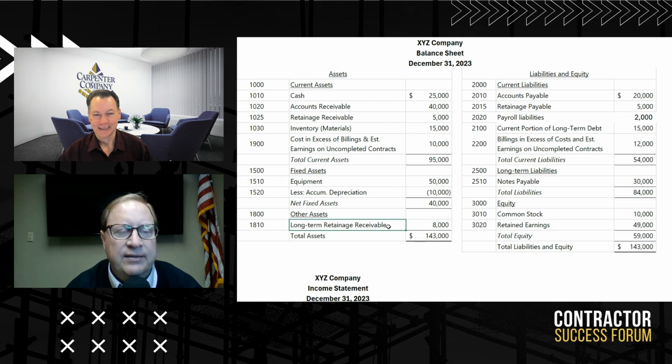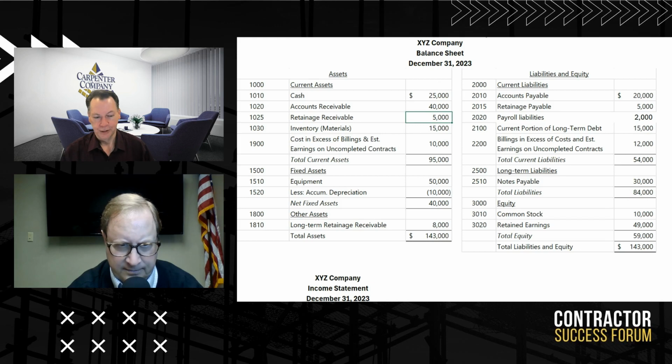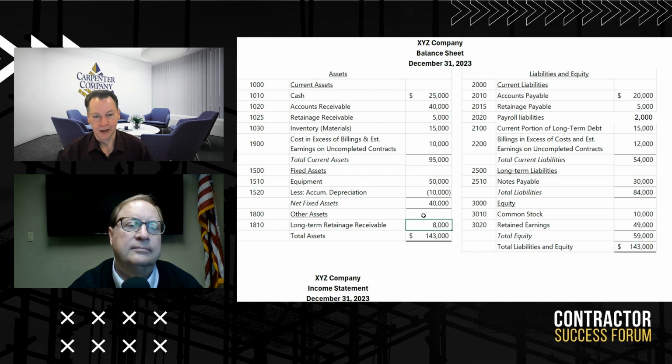Okay. So 6 to 7,000, your overhead as a percentage of your revenue is a number you need to tie into your estimates, right? It is, and several times I'll have a contractor and they're very inconsistent. They may have sub up here, but contract labor down here. And being consistent is one of the key things I would tell you to do internally. But externally, if you're trying to compare this with other grading contractor industry statistics and you're not following industry standards, you're going to say, why is my overhead so much more or less than industry standards? As well as the bonding company and the bankers may be questioning what's going into that.